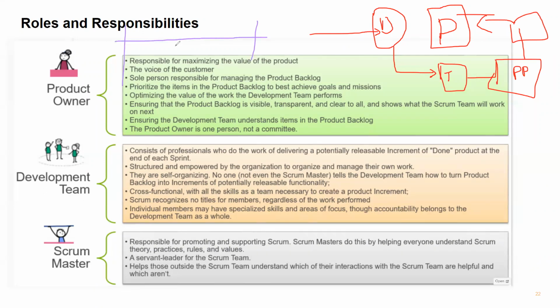In this 2-week sprint, week 1, week 2, what all things do you need to do? You need to develop, you need to test it. By the end of the sprint, you should have a releasable product, meaning this whole cycle should happen in these 2 weeks.